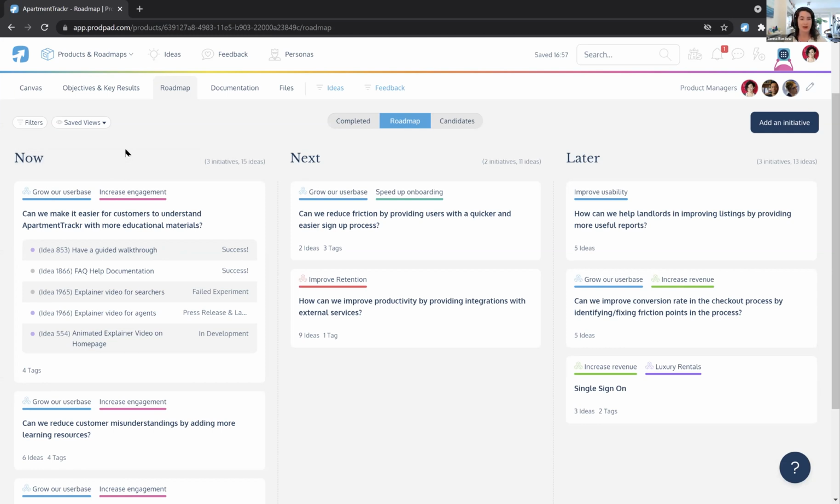And really key is how this roadmap allows you to connect what's actually been done to your outcomes. A lot of other roadmap formats encourage the team to just think about what they're going to be building next and how quickly that's meant to be done. And that doesn't necessarily mean that you're going to get a great roadmap, a great product, sorry. What this format allows you to do is to mark things as completed. So once you've actually finished something, don't delete it, move it to the completed column.